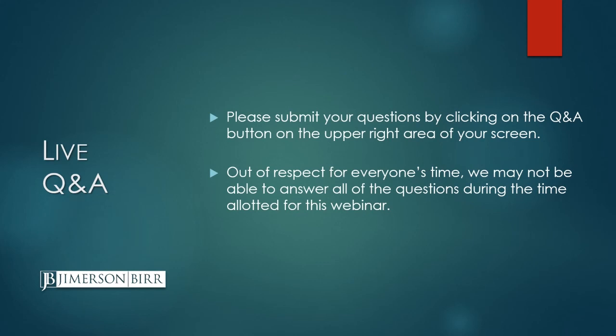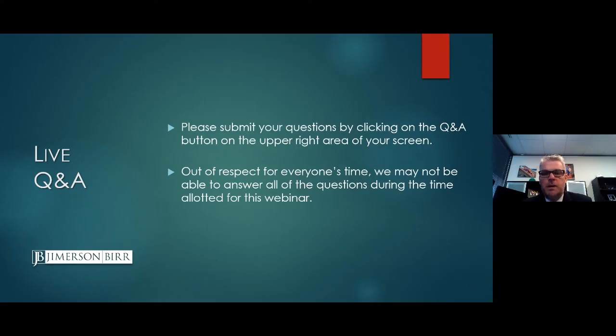First one that came in is, if the subcontract contains a pay provision, can the subcontractor still report a lien or make a payment upon a claim? Elizabeth, I'll take that one. The answer is yes, they can. So you need to be careful of that. There's not much you can do. When it comes to a bond claim, if you're in Florida anyway, if you have a conditional payment bond and you have a pay-if-paid provision, you may be able to eliminate any bond claim, but you're not going to be able to eliminate a lien claim.